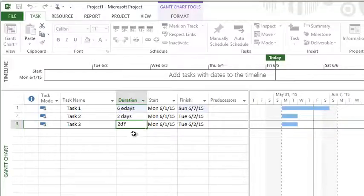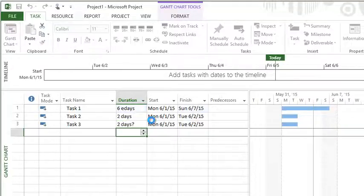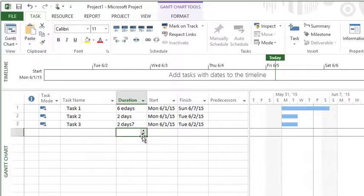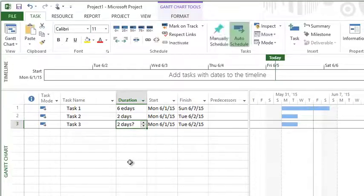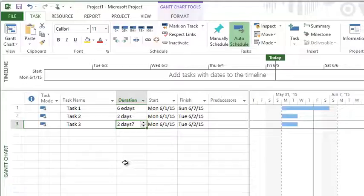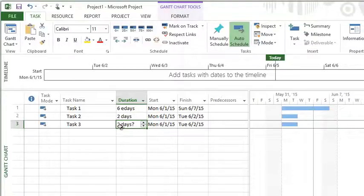I would suggest putting 2d question mark. Think of this kind of like a flag, and now I know that that is an estimated duration. I got to go follow up and do some more research to get a more accurate duration for that task. So that's how you can quickly do an estimated duration.